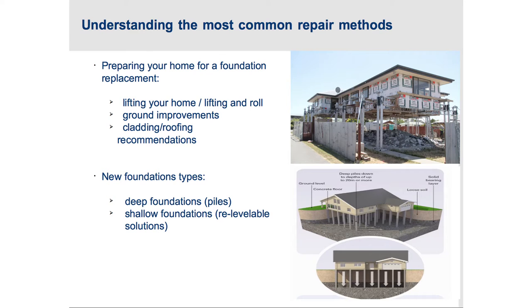Some of the more common repair types - you may remember a few years ago we started to see a lot of houses up in the air, like this one in Rolleston. At that point it was one of the most common repair methodologies, and it's still used today. One disadvantage is there's not a lot of kit available to lift houses, so there's some time delay and it is quite invasive. This brick house in the picture has to be de-clad, bars put through the middle, and then lifted on a hydraulic lifting system.